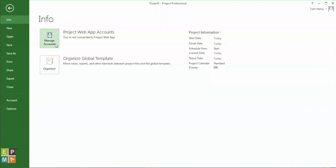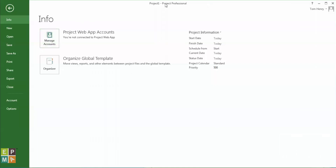If you don't have Project Professional, you won't see this Manage Accounts option. The Project Standard version only has the ability to do some basic Microsoft Project stuff — most of it's there — but what you don't get is Manage Accounts. You cannot connect to a Project Server environment. So if you do have Project Professional — and I can see at the top of the screen here it says 'Project Professional' — you can click Manage Accounts.